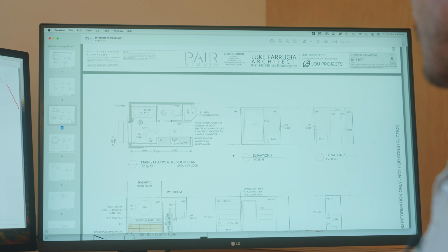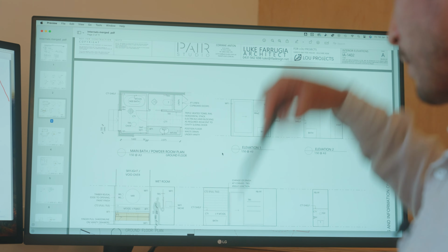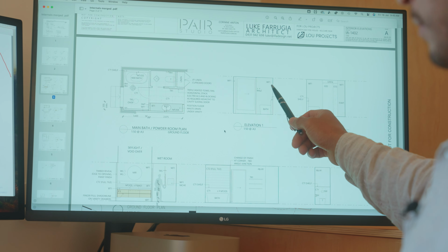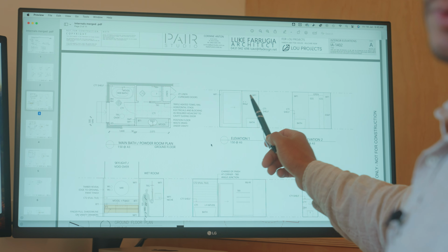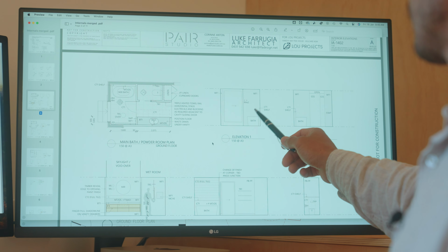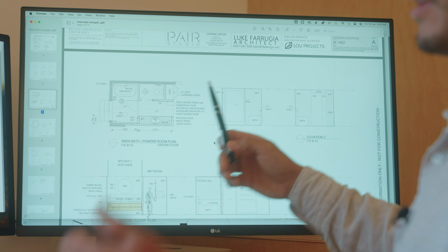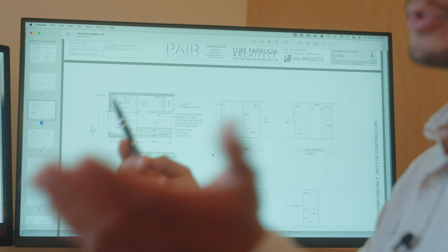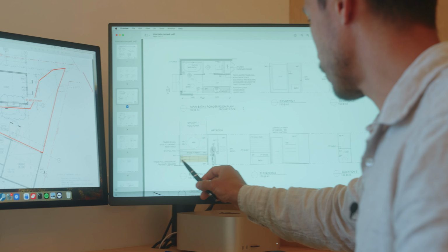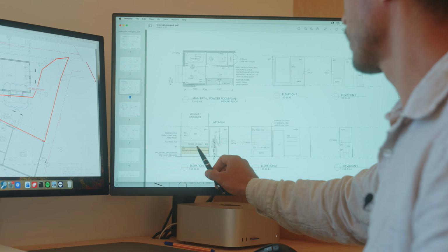And the same with the bathrooms. WF1, going back to that schedule, I know what it is, it's a Venetian render. We need to know what the finish on the wall is going to be. If the expectation is that it's going to be a Venetian render, then that's 450 or 400 bucks a square meter versus 150 or 200 bucks a square meter in tiling. And we also need to know what the joinery finish or what the design is for the vanity.